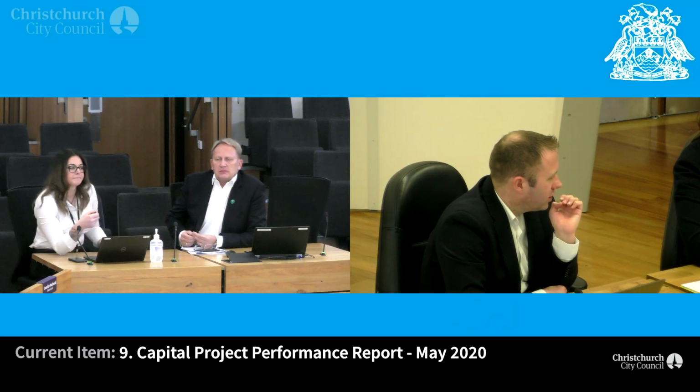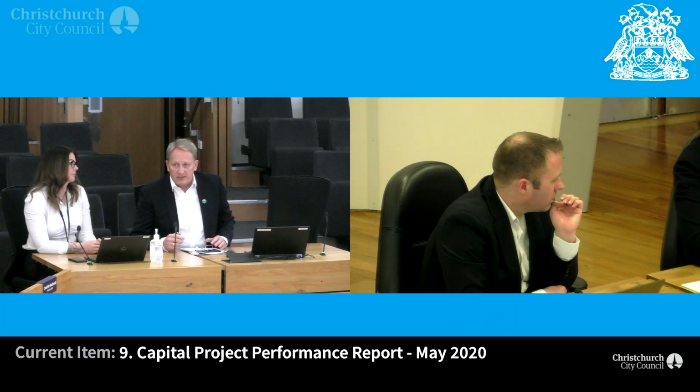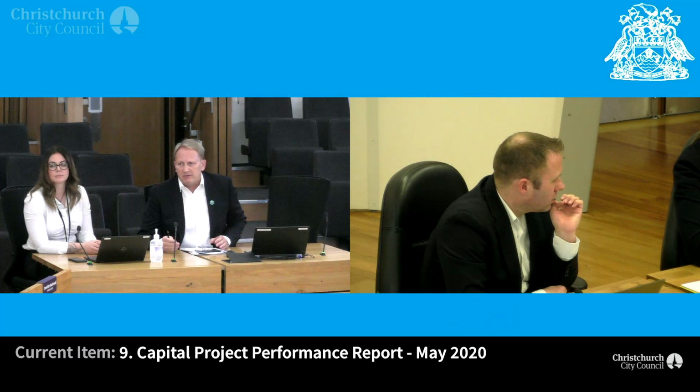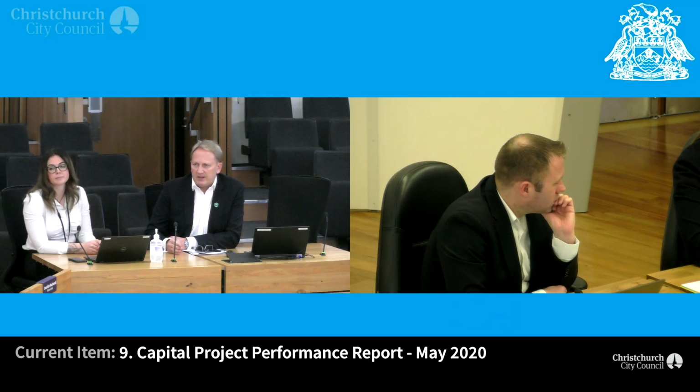Right. And it is very much an unknown, but we're in that stage right now, as you know. We've broken ground now, and we're doing the demolition work on site, so that risk will be mitigated in the next 2 weeks anyway with regards to what we find in ground. We have done detailed site investigation, you're correct, but we can never say we will never find anything of large scale that could impact the project and could therefore not be costed for. So therefore it sits as a risk, and that's just good project management.